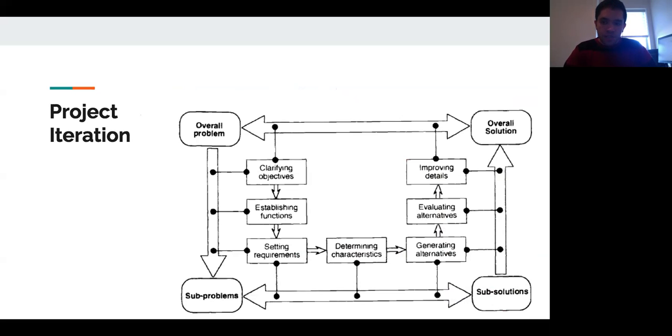And during that process of iterating within those phases in the Gantt chart or within those weeks or time-bound problems that you set for yourself, you have to always go back to the overall problem to ensure that the objectives or functions, constraints, and requirements are confined to the solution that you're generating, so that you don't run into problems where you forget that there's a structural requirement, a technical inspection requirement, or some sort of assuring test that you didn't perform on a bolt.